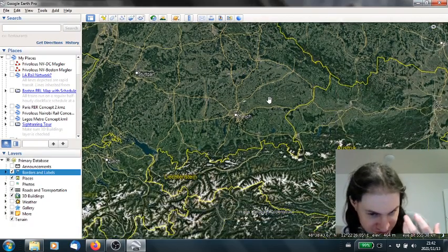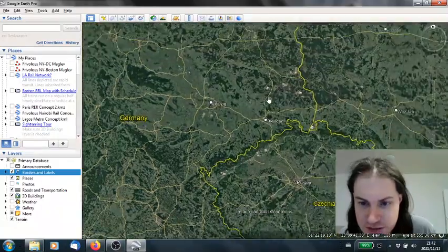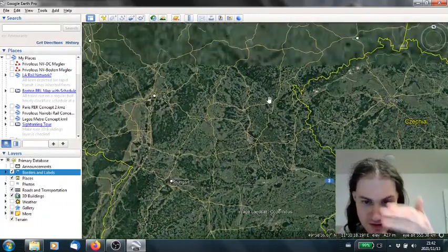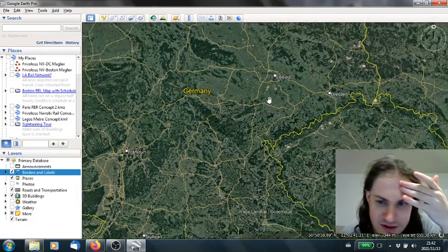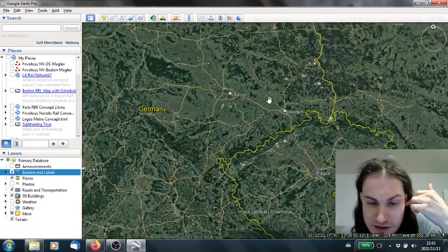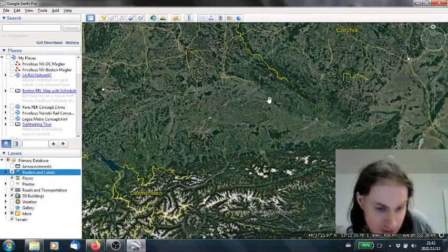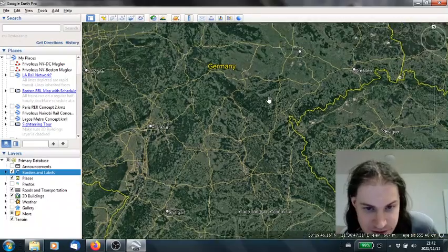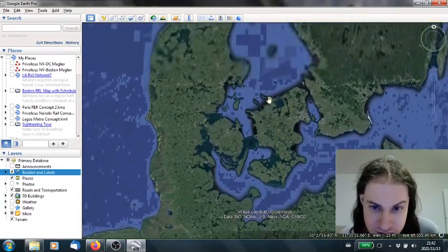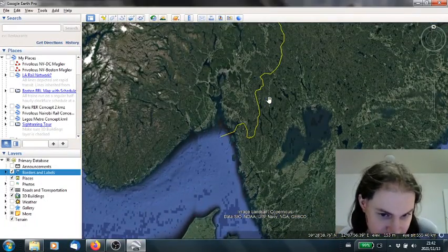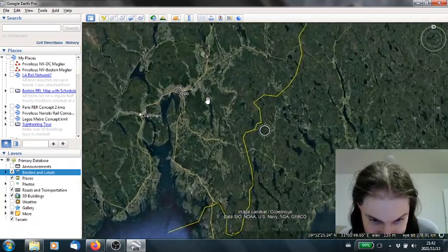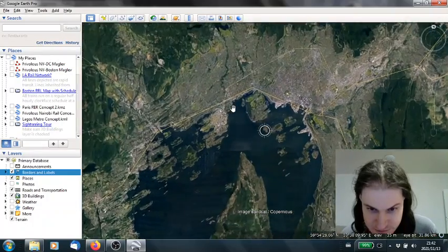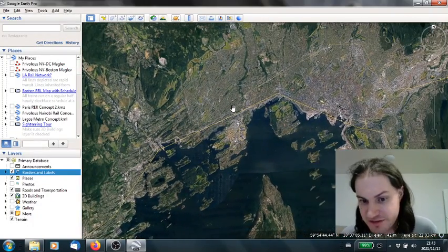And again, all of these are soft factors. Procurement issues aren't going to be seen in how the stations look. Yeah, in New York, they use ungodly expensive techniques for building stations within mining. But Second Avenue Subway Phase 2 is not mined. Two of the three stations are cut and cover. And hell, the Fornebu line in Oslo, the stations are mined. That's why it's so expensive. Except that in Oslo, so expensive means $200 million a kilometer, not $1.7 billion.